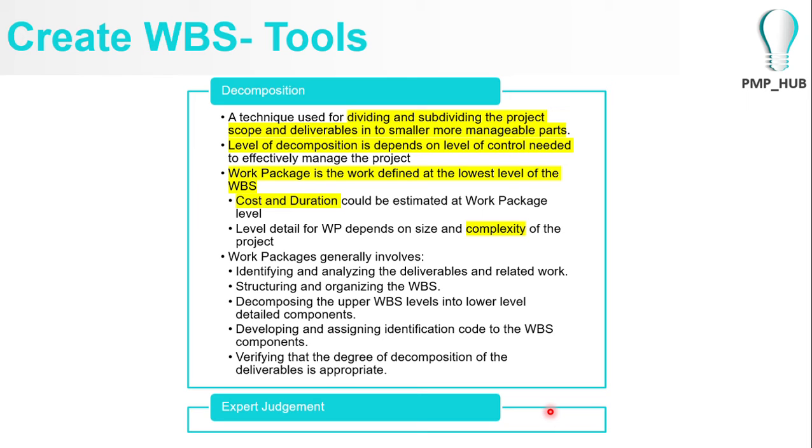That is the work package level, where you define how much greater a degree you can go. Obviously, in larger projects you start decomposing into phases, then phases into sub phases, and you go on to a level at which you can have control.